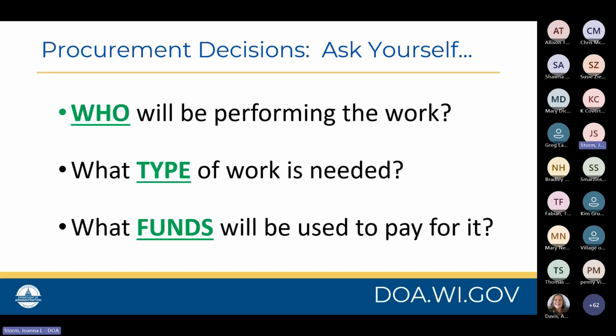So when it comes to beginning the procurement process, you need to ask yourself a couple of quick questions. First, who will be performing the work? Then, what type of work is needed to be done? And what funds do you intend to use to pay for that work?